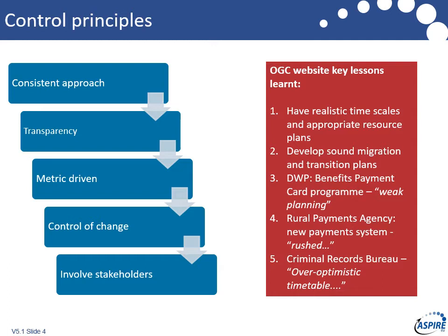Don't believe that it's a one-off. There is no such thing. And if it misses a stage gate deadline, it's going to be very late. So we've got to be metrics driven. And just on that stage gate thing, quite honestly, if they miss their stage gate, they should be put red, because that project is definitely in trouble. Now, at a program level, we are a little bit looser around milestones and gates, but they're just as important.